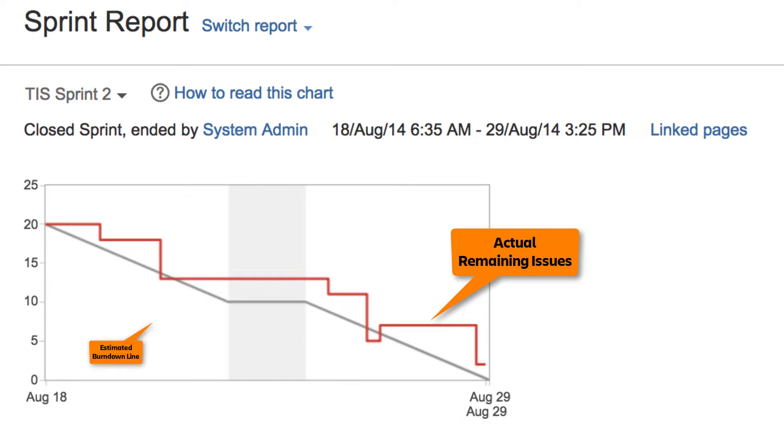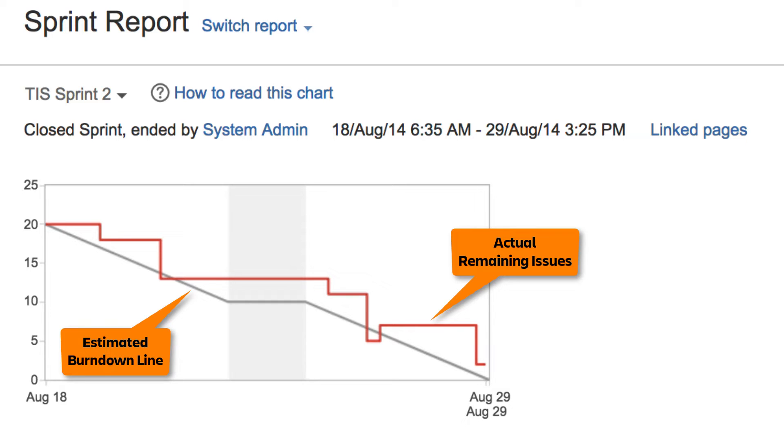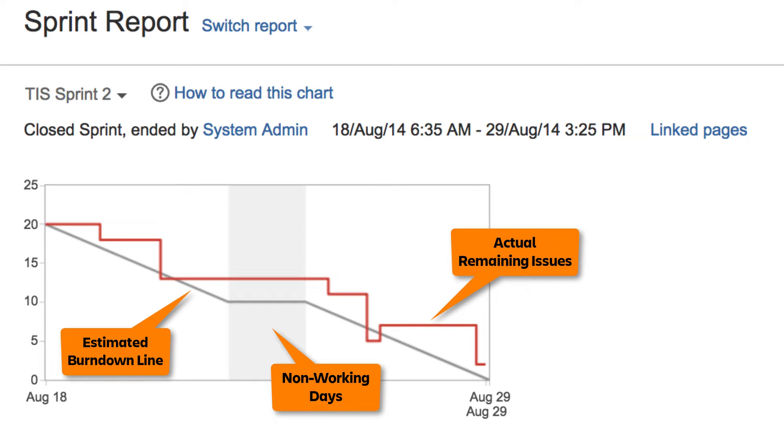The gray line represents a linear progression from the beginning to the end of the Sprint. At any point in time, it indicates a projected number of issues assuming steady progress through the Sprint. The gray vertical areas represent non-working days.